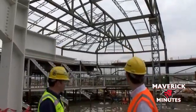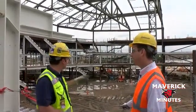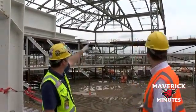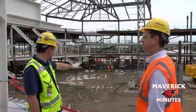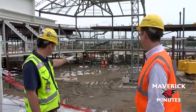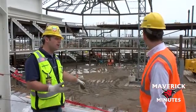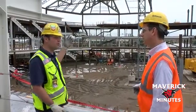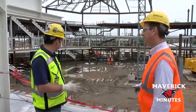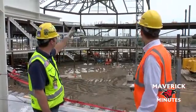So if we remember that plan when we were looking at that, we erected that in halves. We had the shoring tower that you actually see here on one of the T1s, so we set that up. We've got all the engineering, PE stamped from the ground soil conditions, from the crane mats there, and that whole shoring tower with the Queen Mary sitting on it, and everything's all engineered from a third-party designer that one of our subcontractors hired that's a specialist with truss erections on arenas. And he's been within an eighth inch of where he's going to be when we've been setting these trusses.